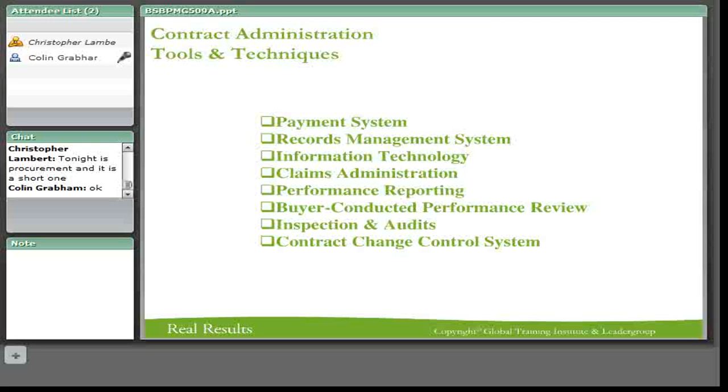So that's performance reporting. That's where you gather the detail of performance, and then you build up a fantastic database of what it should be, so the next time you'll estimate better. That really comes down to detail. If you've got teams, you really need to start keeping a record of that.